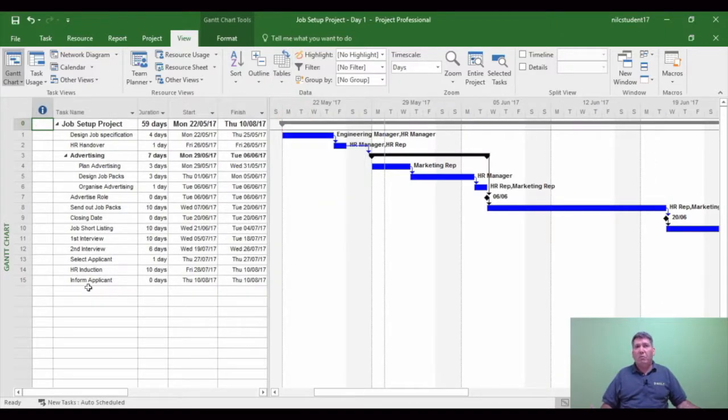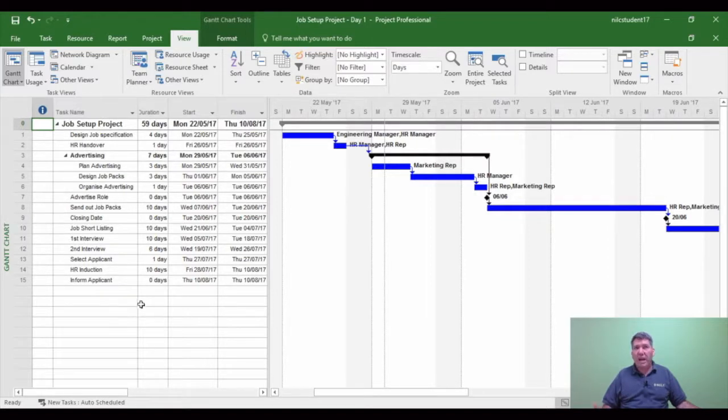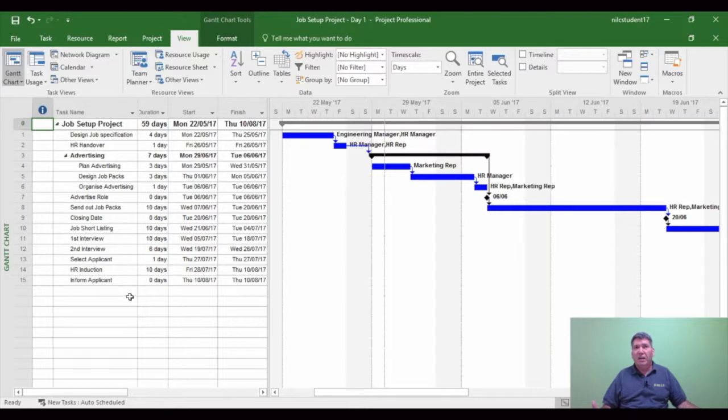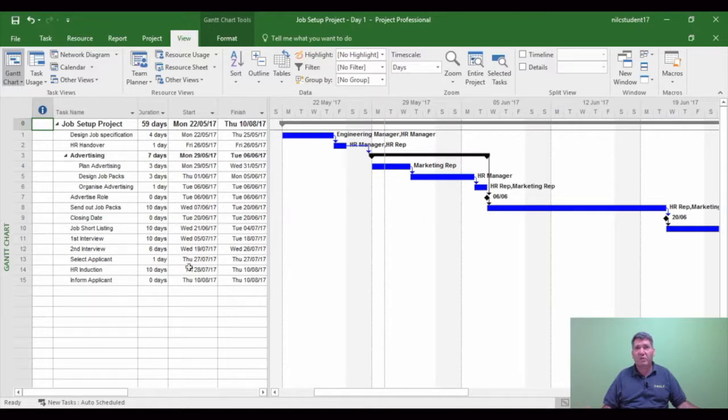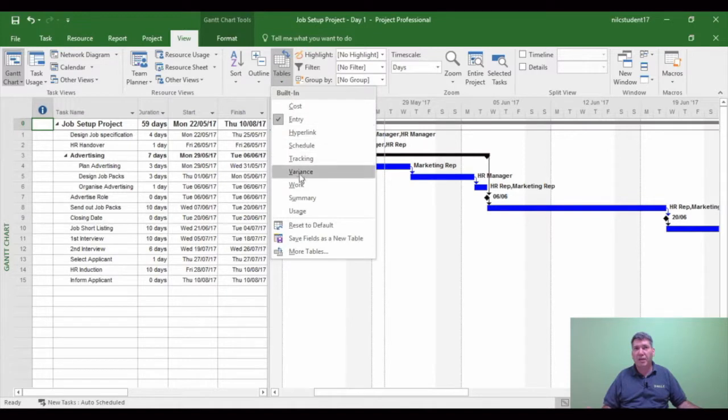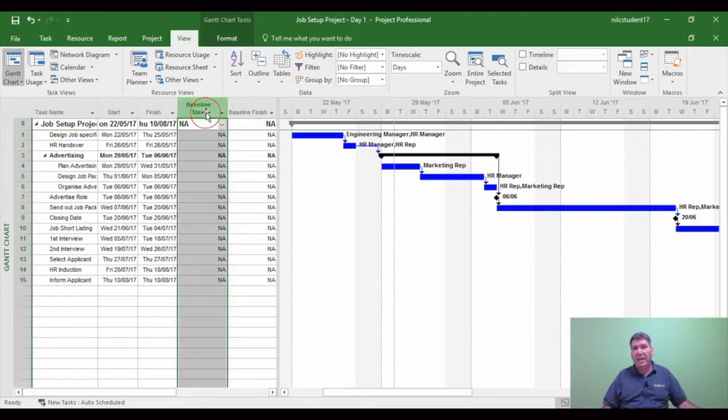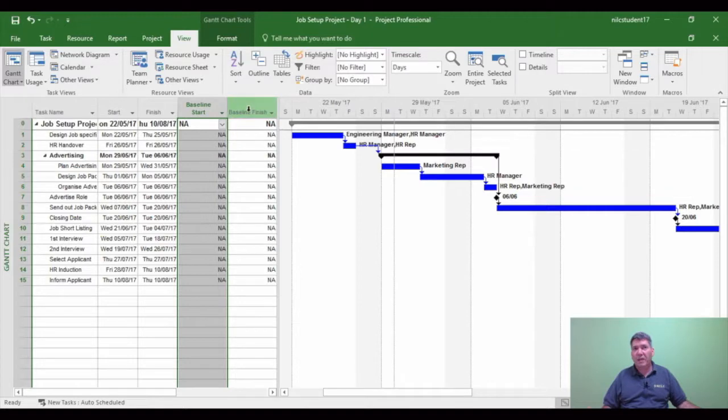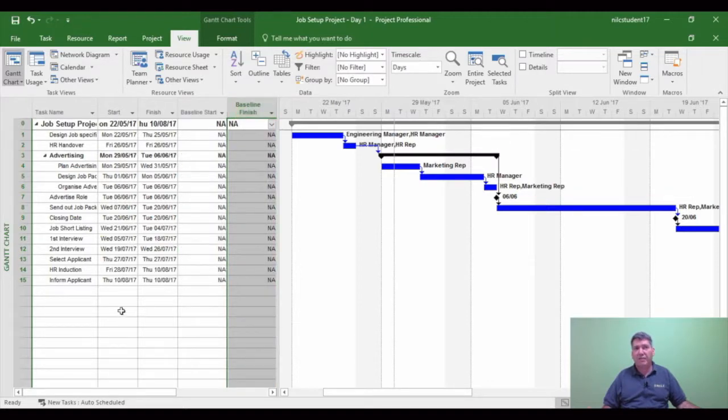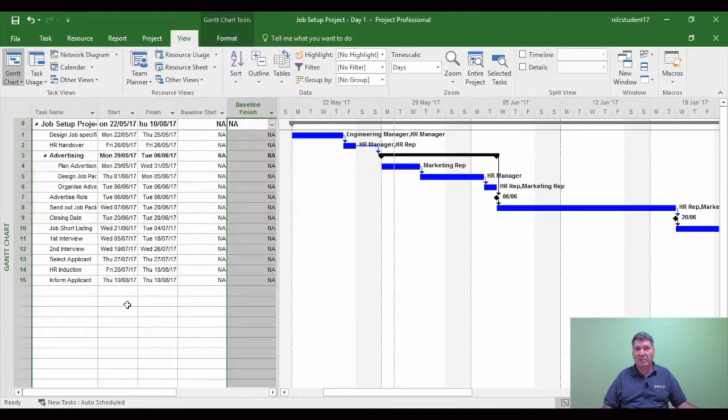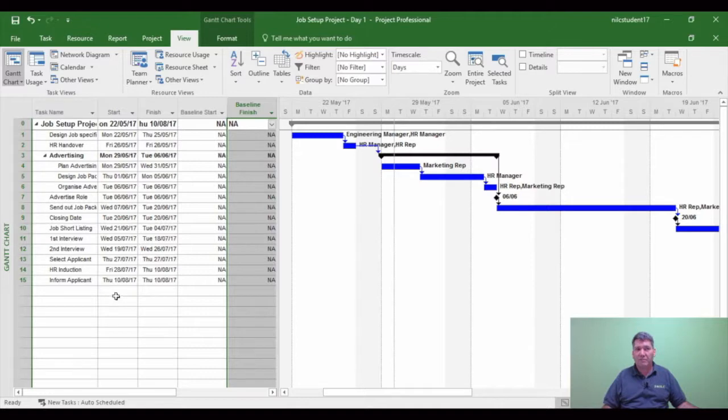Now when we're setting a baseline, we need to know what areas affect the baseline. So there's a table that tells you where a baseline has been set. And the easiest one to tell you that is actually what's called the variance table. So on the view tab, if I change tables and go to variance, you'll see NA for baseline start, NA for baseline finish. Now that means no baseline has been set. If you ever see NA, that means no baseline set for the project.